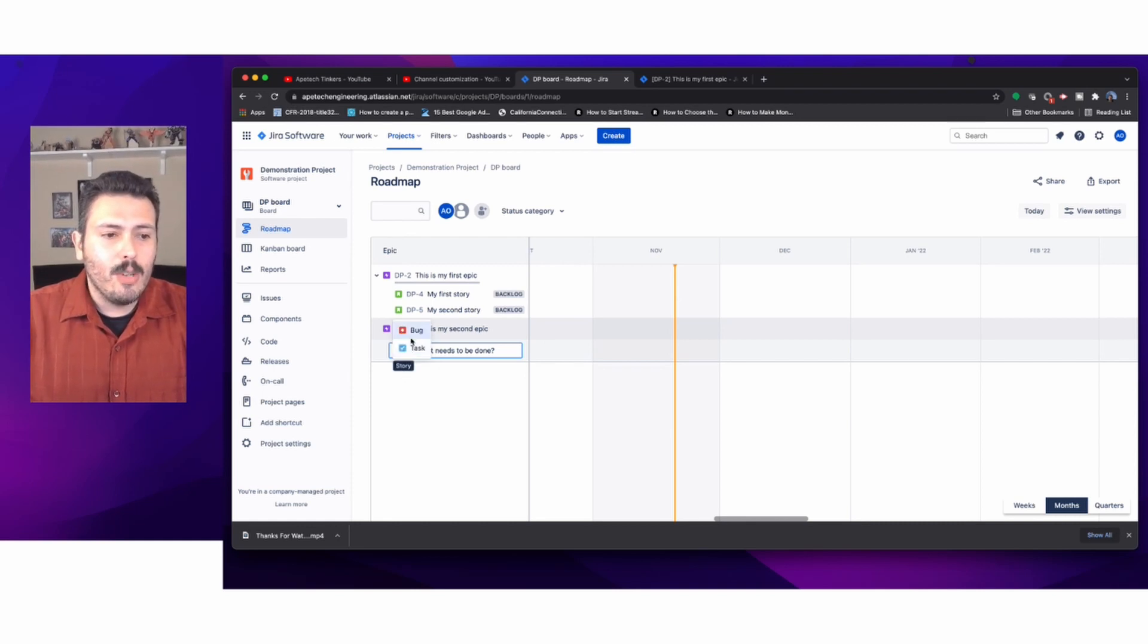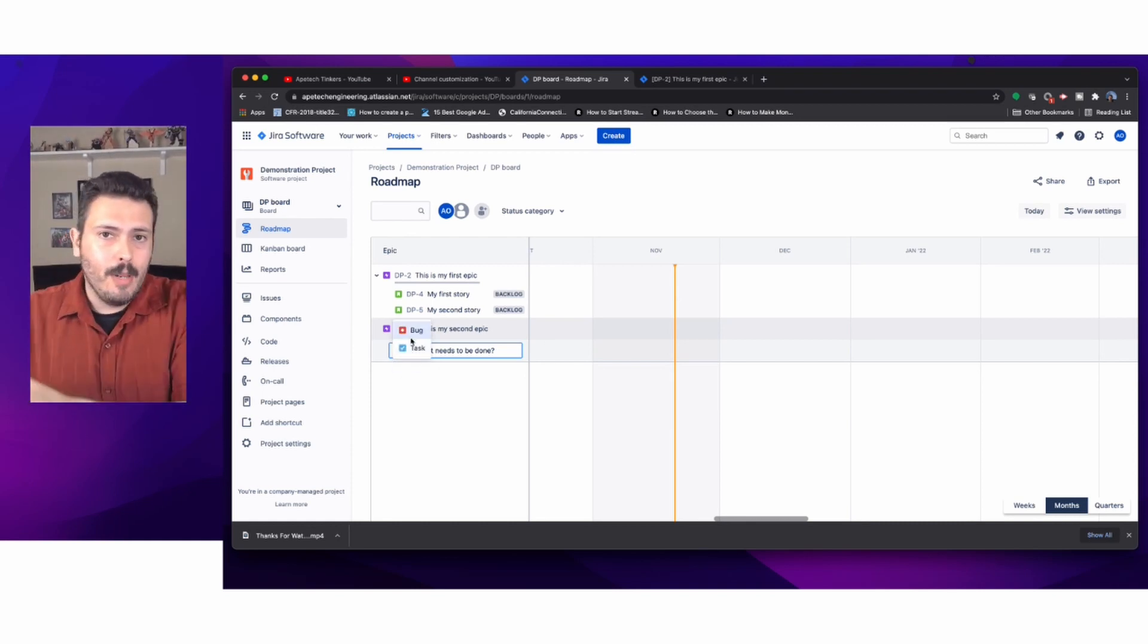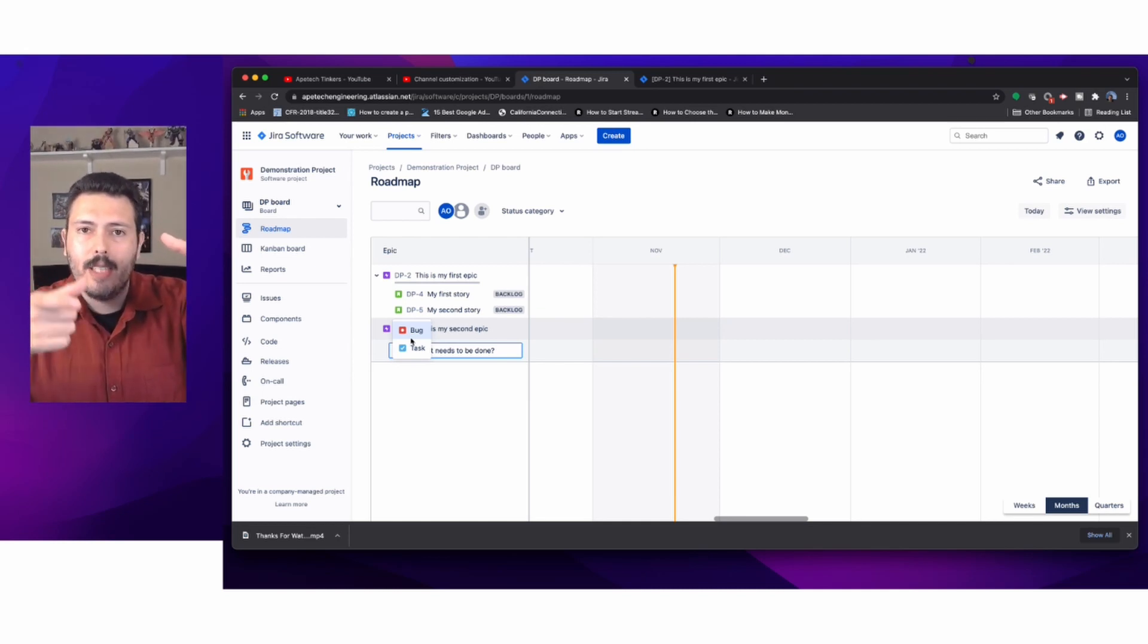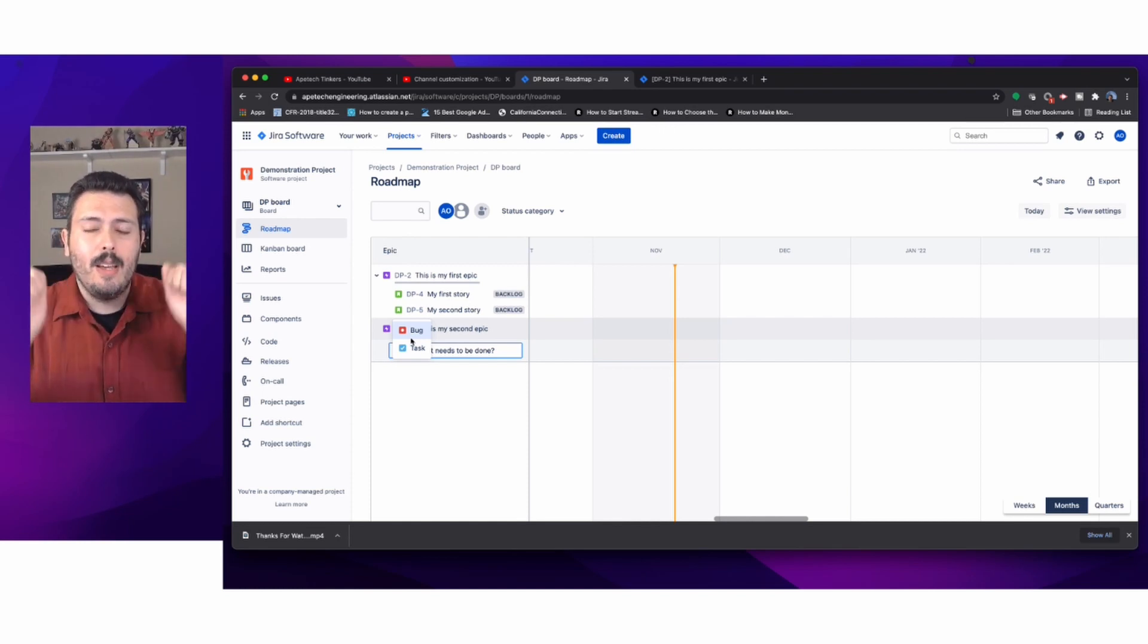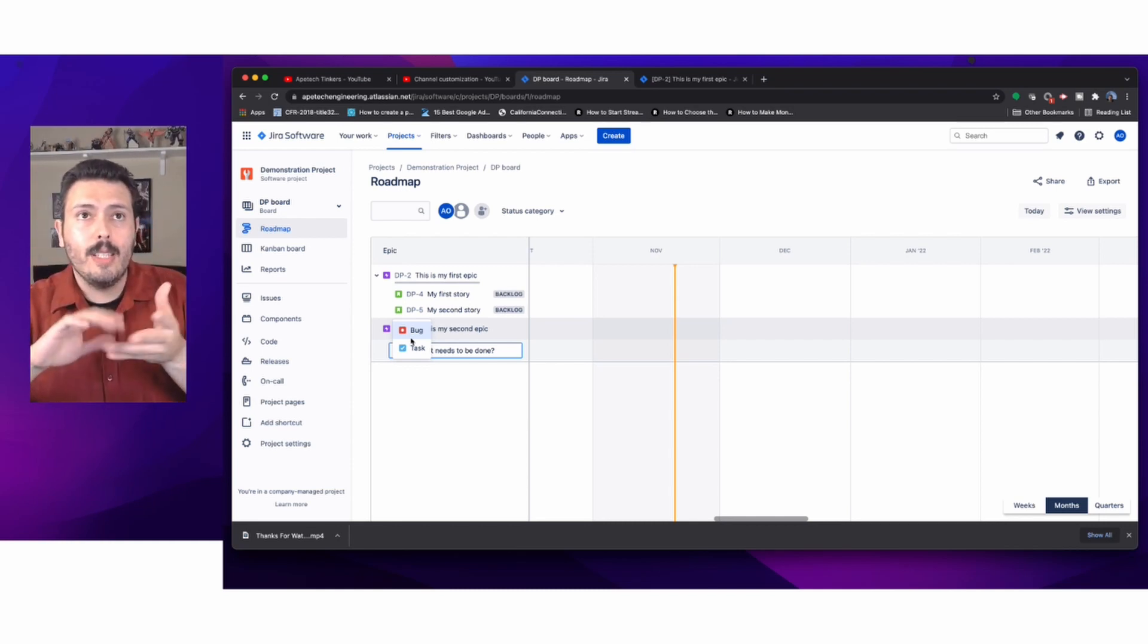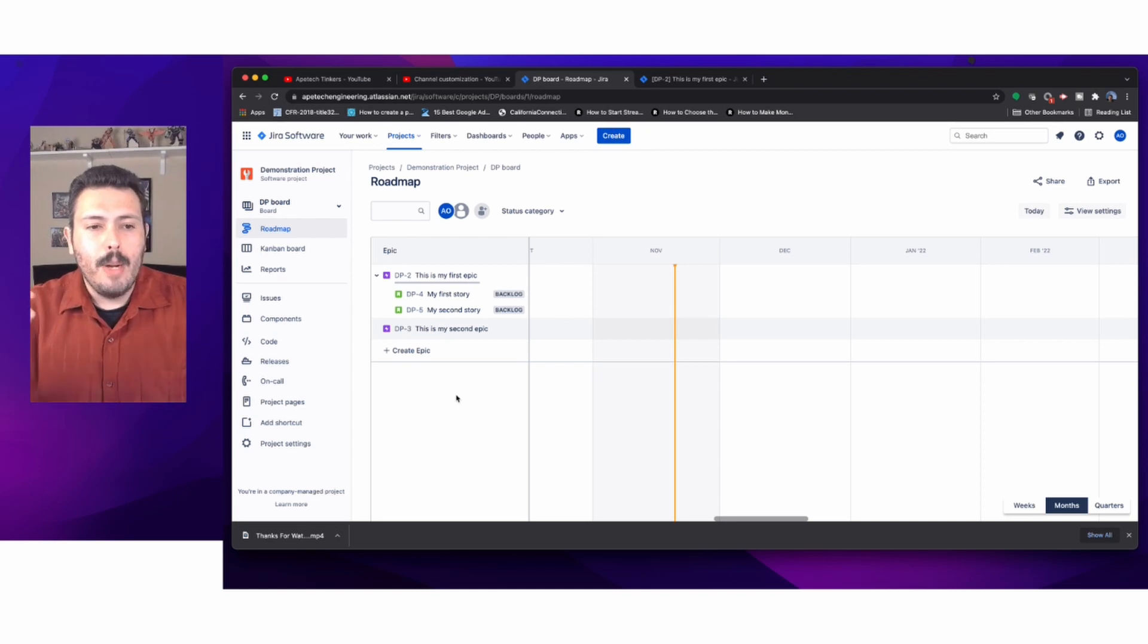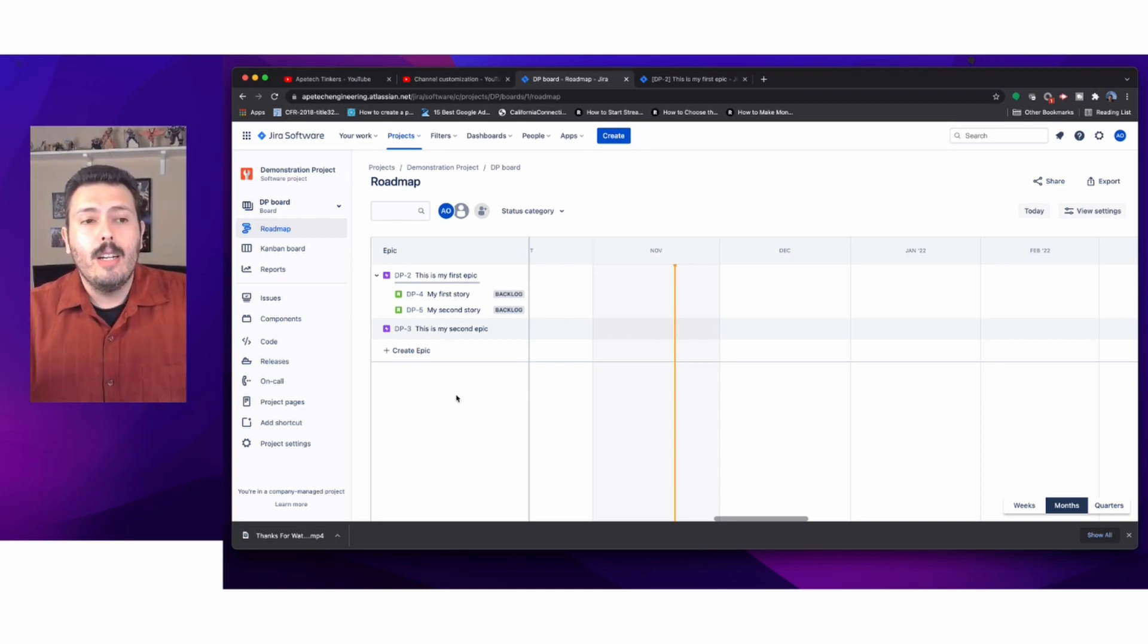Whether it be a story, task, or bug, Jira treats stories, tasks, and bugs at the same hierarchy level. A story cannot be the parent of a task. They live at the same hierarchy. An epic, however, can be the parent of any of these three, and the story, task, and bug can be a child of the epic. Stories, tasks, and bugs can have children, typically known as subtasks.